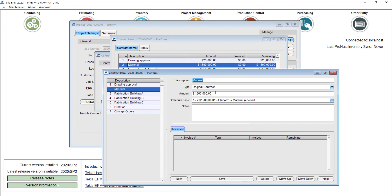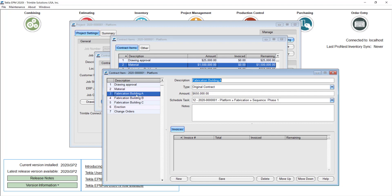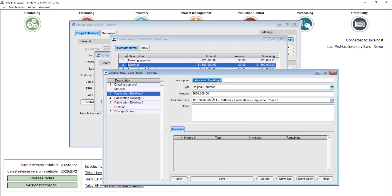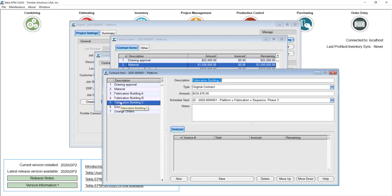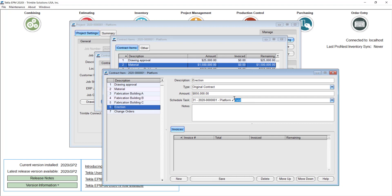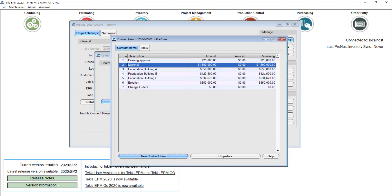You can see the material is linked to the actual task of material received in my Gantt chart. Fabrication Building A, B, and C is actually linked to the fabrication of each one of the sequences in my Gantt chart. And then I have the erection linked to the overall field status in my Gantt chart. I'll go ahead and save this and close this screen.